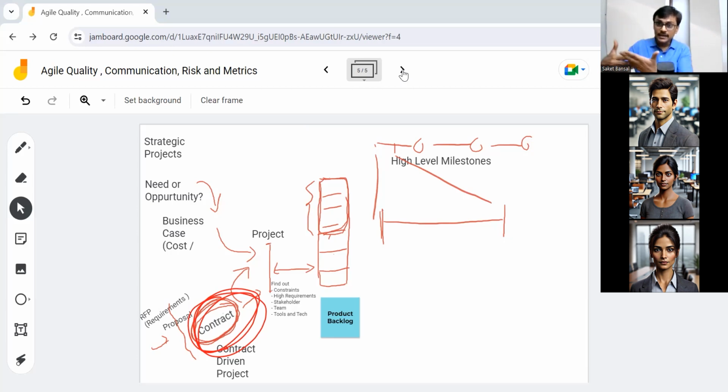Then you have a project, but you have flexibility. You can say, we want to change something, we'll change it. No change request is needed because our money is coming based on timesheets. We fill the timesheet, what we have done in a month, and we get money. So we will keep filling timesheets, and if the manager keeps approving them, we will keep getting money. So as a vendor, I am not worried. And I will say, guys, you follow your boss's instruction. You don't have to do any documentation for the change. Perfectly okay.